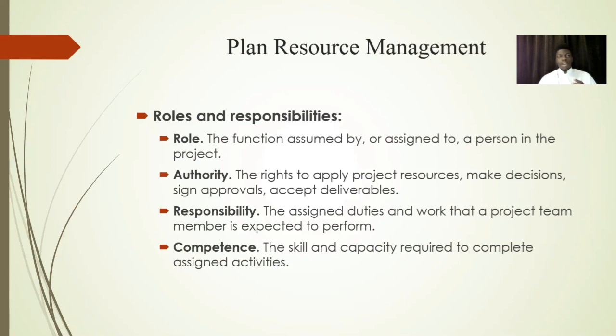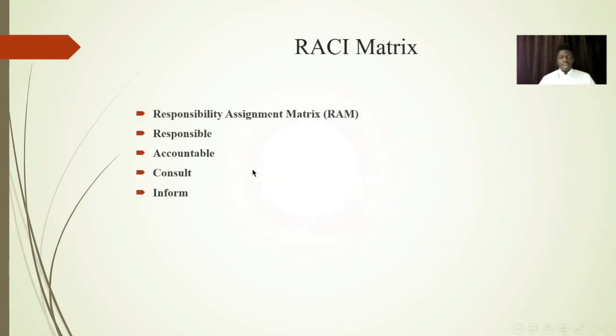One of the most common methods to assign tasks to resources is the RASI matrix. RASI matrix is the responsibility assignment matrix. That's one of the tools that we are going to use to get that output. The RASI word came from responsible, accountable, consult, and inform.